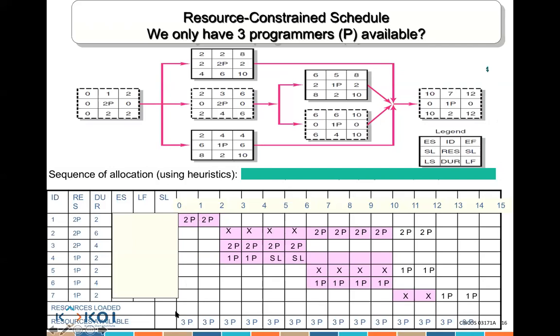I'm using 2 people here, 2 here, 3 here, 3 here. That's all the information. Now, when is the early start for activity 1, guys? 0. When is the early finish? 2. Any slack? No, no slack.